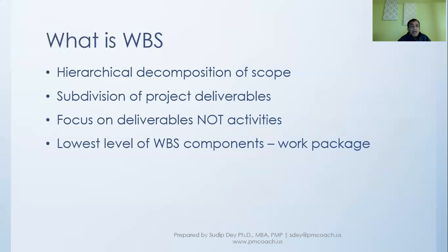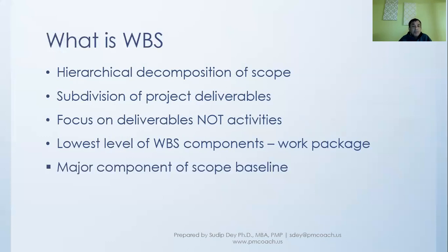The lowest level of WBS components is the work package, and the work package is what will drive our planning for the project. And as I've said, WBS becomes a major component of the scope baseline along with the scope statement.